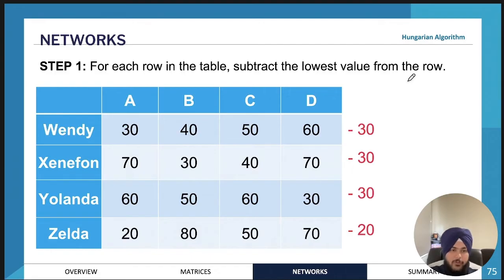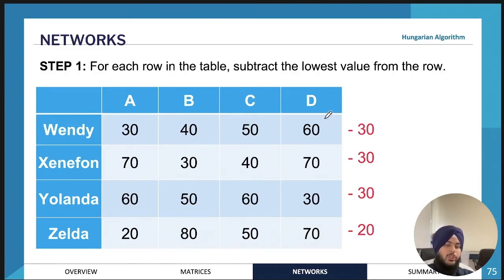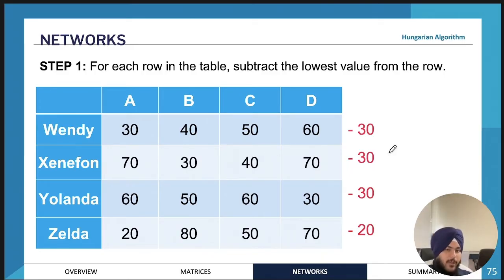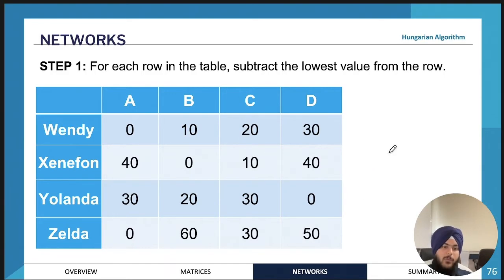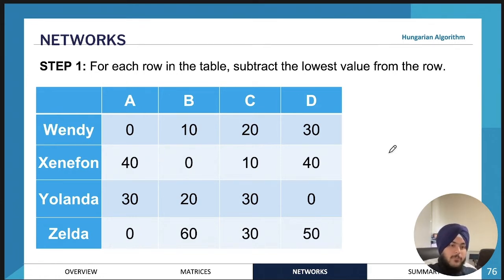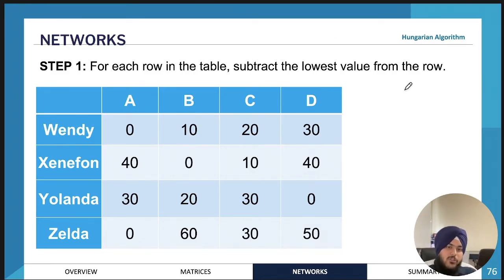Step one of the Hungarian algorithm: for each row, find the lowest number and subtract it from all numbers in that row. For example, in the first row the lowest number is 30, so subtract 30 from every entry. Similarly for the second row, the minimum is also 30. Once that's done you get a new table. Using matrices on your calculator for these subtractions can be very helpful.